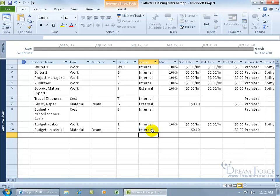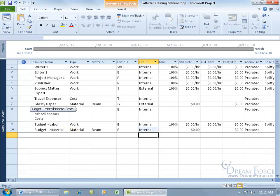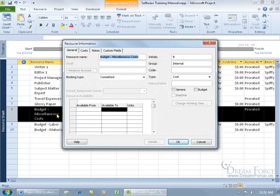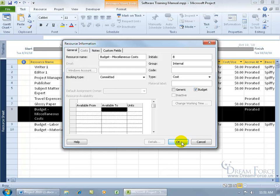Except that when it comes to entering in your budget resources, project will not differentiate between budget and other resources without setting each budget resource, its properties to budget. So to bring up the information or properties for your resources, go ahead and select it, and then double click on it. And there you go, resource information. Come over here. There's the box for budget. Go ahead and check it. Click okidoki.